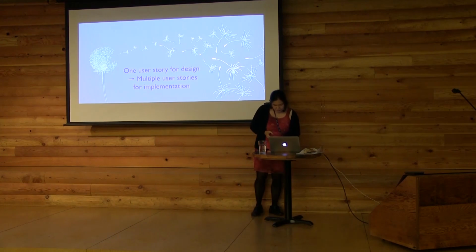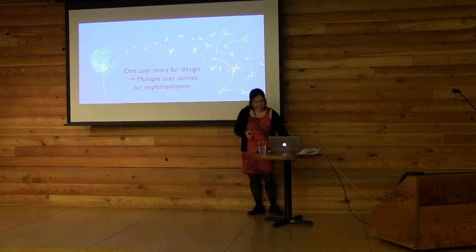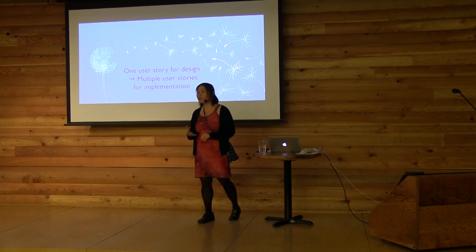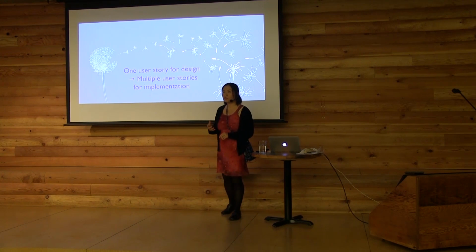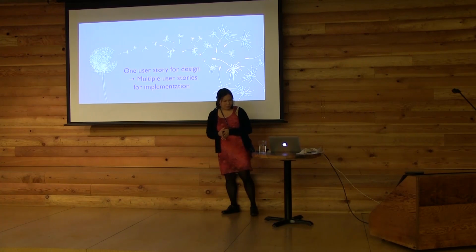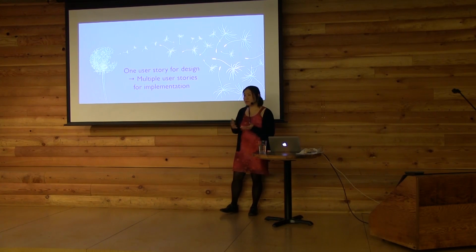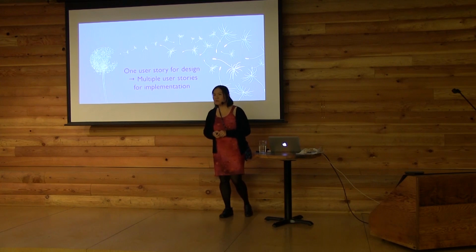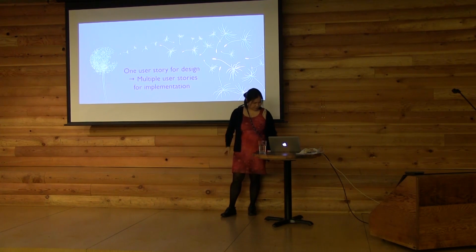You're probably looking at one user story, one chunk of work for a designer, turning into many user stories for a developer. And that's what you would expect. Your ratio of developers to designers is probably something like 5 to 1 or 10 to 1. Okay? Make sense so far?